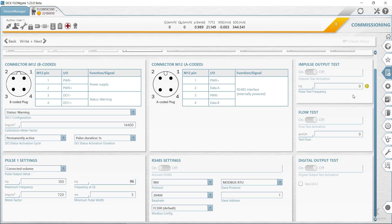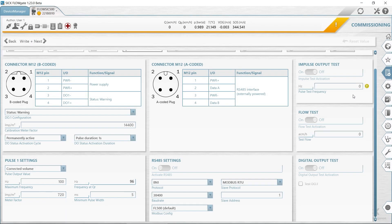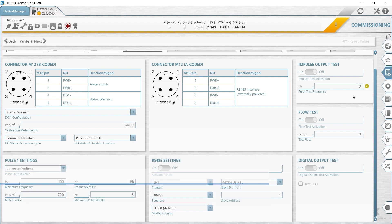In the next step, we will take care of the communication. The configuration of the single plug-in connectors is preset according to the configuration ordered. Check the configuration and adapt when necessary. For pulse outputs, the maximum frequency and the minimum pulse width must be set during commissioning. The status outputs are configured as standard so that the status measurement invalid is already selected.